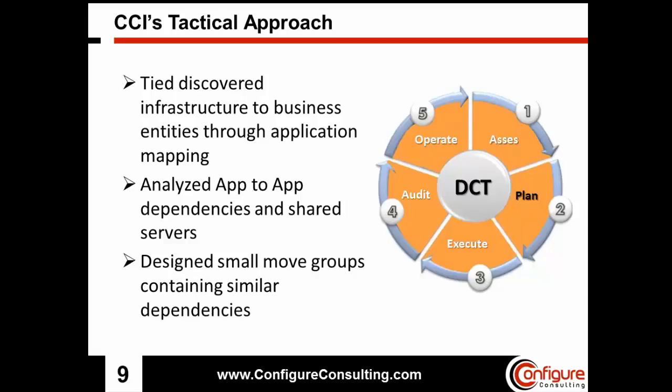And using the UCMDB, we saw the dependencies in place. So we can view those dependencies and circle off these move groups away from the rest of the pack. And essentially what we're calling that is taking these large continents of dependencies and breaking them apart into smaller islands, which become our move groups.